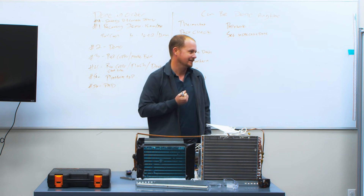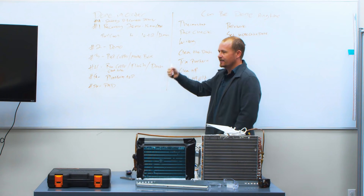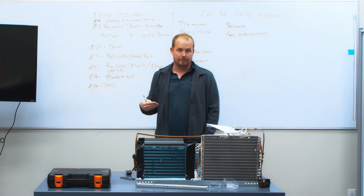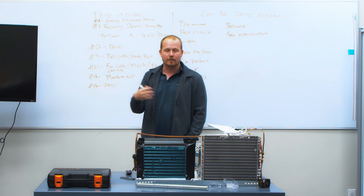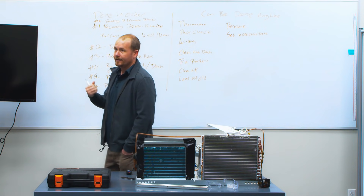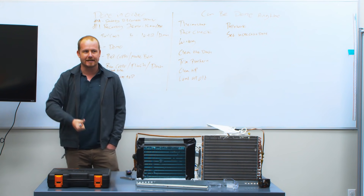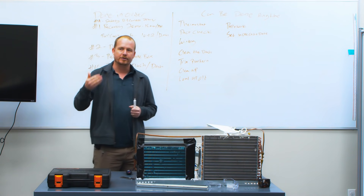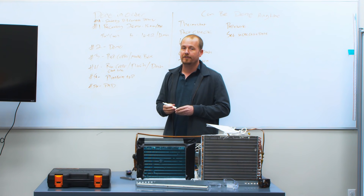The point is: when you're learning these things, intentionally think before you show up on the job about what needs to be done in order — things that are non-negotiable — versus things that can be used as filler while you're waiting. Getting the system under pressure as quickly as possible is critical, so you can make sure it sits long enough to confirm no leaks. Having a leak means you're chasing it the rest of the job — your vacuum won't pull down and you have to start over.